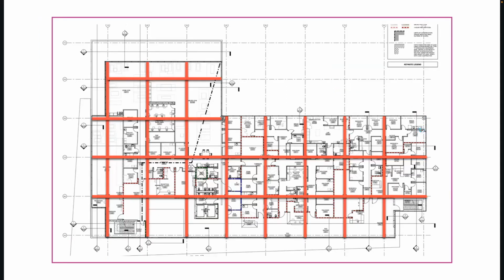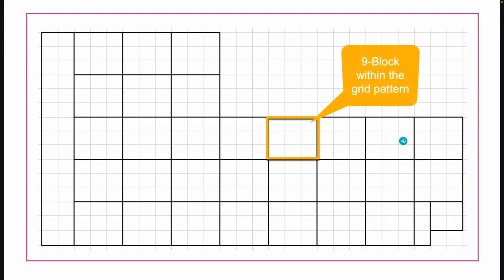The next step is we need to start analyzing work density. I created these red lines here over the grid lines to indicate that we are going to break this floor up into the grid squares so that we can analyze how dense the work is inside of them, so that we can properly outline the boundaries of these zones. My preference, the simplest way in my mind, is to put these 9 blocks, these grid squares, on Excel, and then flip the drawings page by page and analyze the work density.